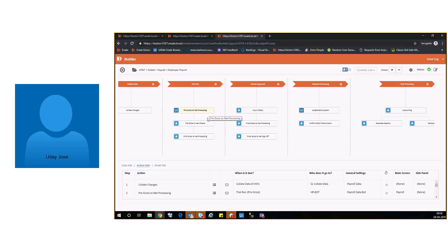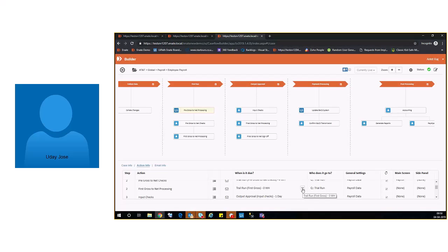Within that, if you go down below, there's a UiPath activity, and a couple of human activities. Each of them also has its own due dates. So ultimately, your entire case's due date is one concept, but within that, all the subsections which together make the entire end-to-end case also have their intermediate due dates. So when work is being driven to individuals and teams, what eNate is essentially doing is tracking what is the next thing from an intermediate step point of view, so that everything is finished in time and builds up to the right overall target due date. Does that make sense?